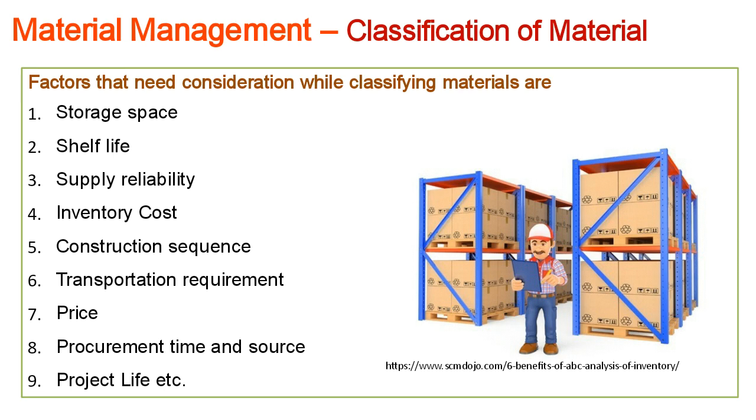And then supply reliability, this is one important thing. Suppose we need to get some export material from abroad. In such cases, sometimes there will be shipping problems, or for any other reasons the project may suffer because of that. So confidence in receiving the materials on time is very important. Then inventory cost: to store and warehouse any material also consumes cost. So we need to find a break-even for this, or we need to understand